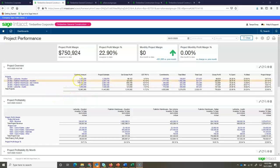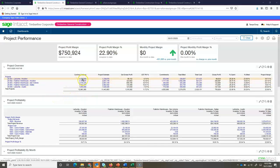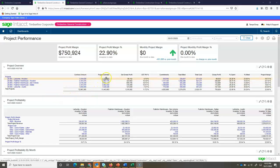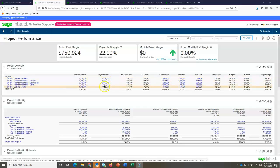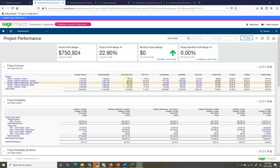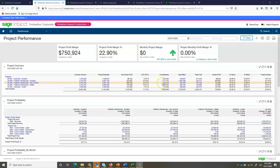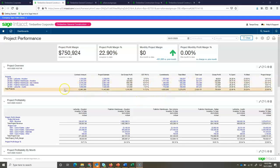From this dashboard I can see contract amount, project estimate, which could come from the primary estimate that I've set for the job. Sage Intact can then calculate gross profit percentage, it can also pull in commitments, what's been billed so far, total cost, giving me a lot of components of a typical WIP report.